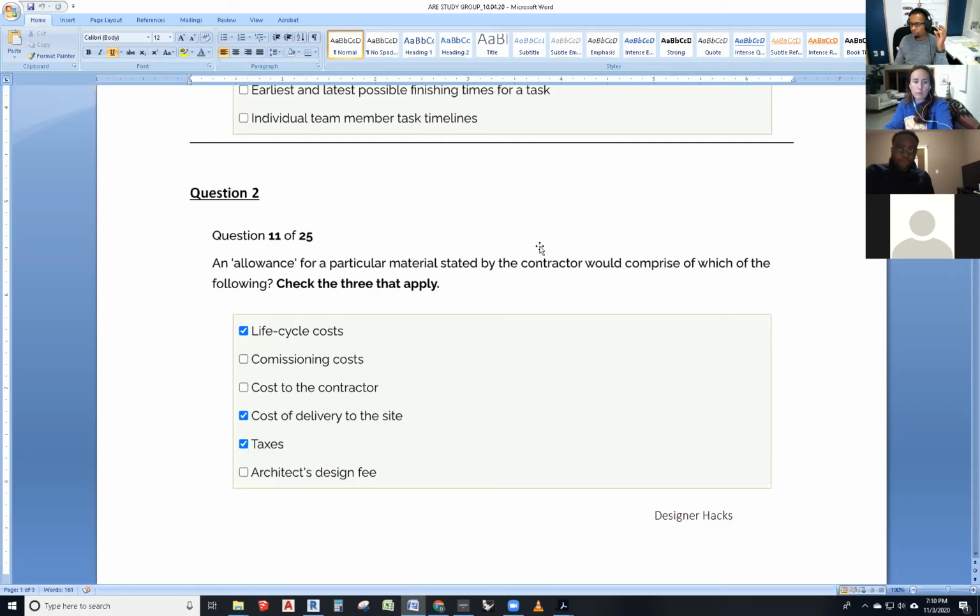Okay. Yep. Unit price again is just a list of prices for what the cost of those things are. It could be a cost per cubic yard of digging of soil, a cost per cubic yard of concrete, a cost of certain material, a brick, things like that. And they just put a unit price for all of those things. And whether they come into play or not, they are already included. And it's relevant stuff. It's not unit price for things that they won't use on the job. It's things that they're gonna need, but they don't know how much of it they're gonna use, right?